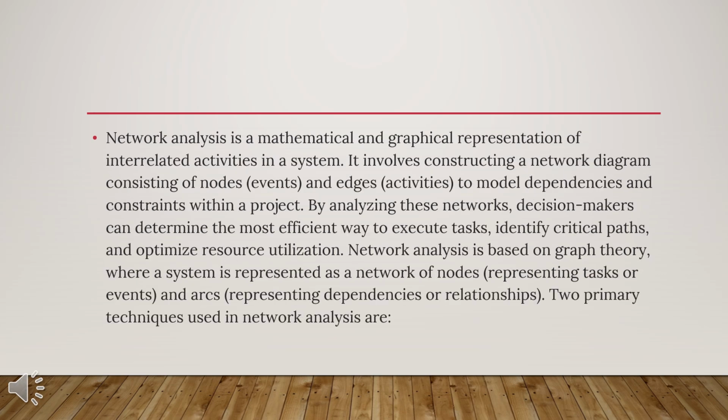Network analysis is a mathematical and graphical representation of interrelated activities in a system. It involves constructing a network diagram consisting of nodes, events, and edges, activities, to model dependencies and constraints within a project. By analyzing these networks, decision-makers can determine the most efficient way to execute tasks, identify critical paths, and optimize resource utilization. Network analysis is based on graph theory, where a system is represented as a network of nodes, representing tasks or events, and arcs, representing dependencies or relationships.